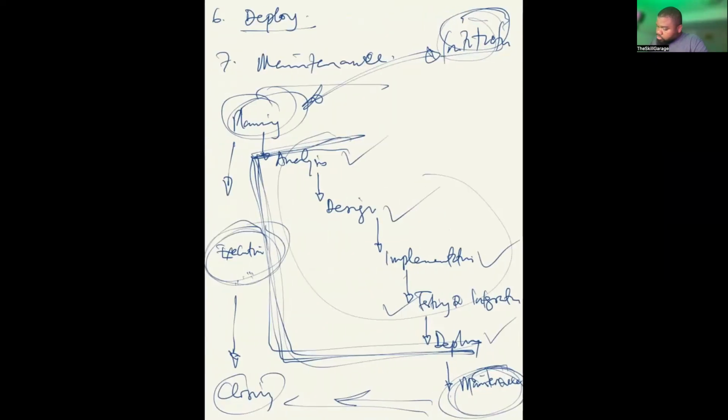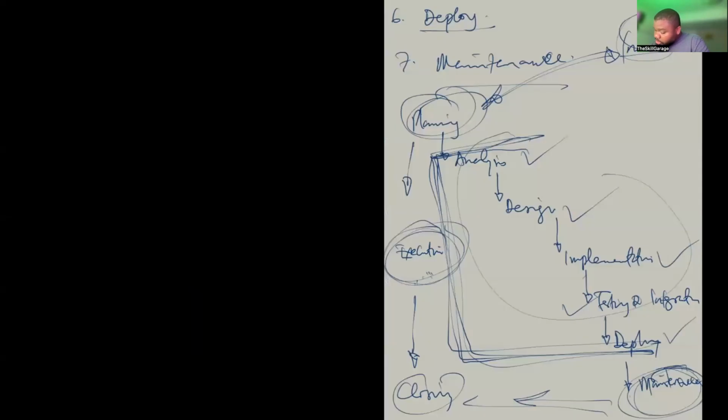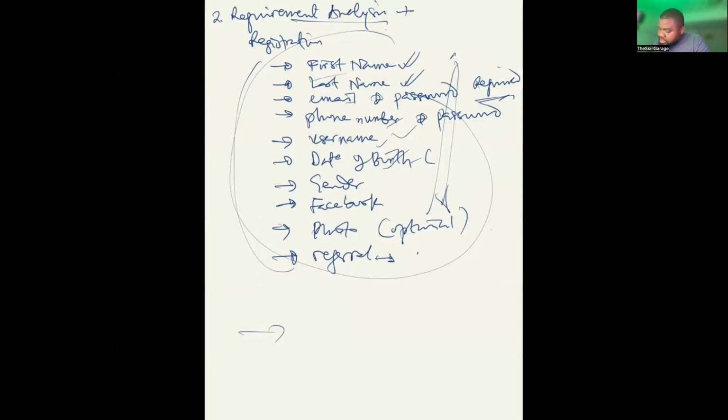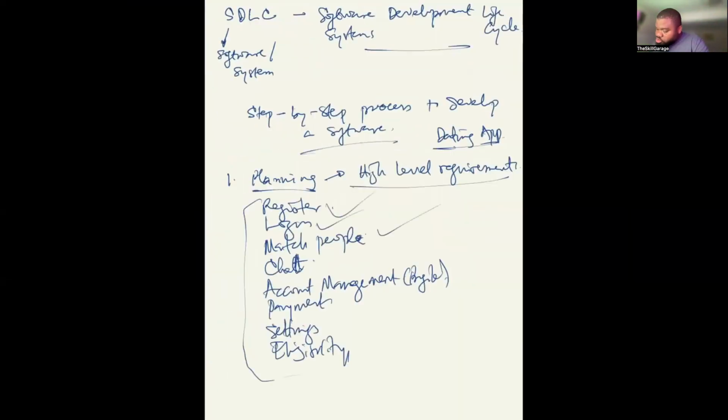So this is what I'm saying. Waterfall. So in Waterfall, okay, you do analysis. After all the analysis is done, you then do the design. After all the design is done for everything, from registration, remember that requirement that we put together, from registration to login, you get all this first. So all this has to be documented. The details for all this has to be documented before you start design.